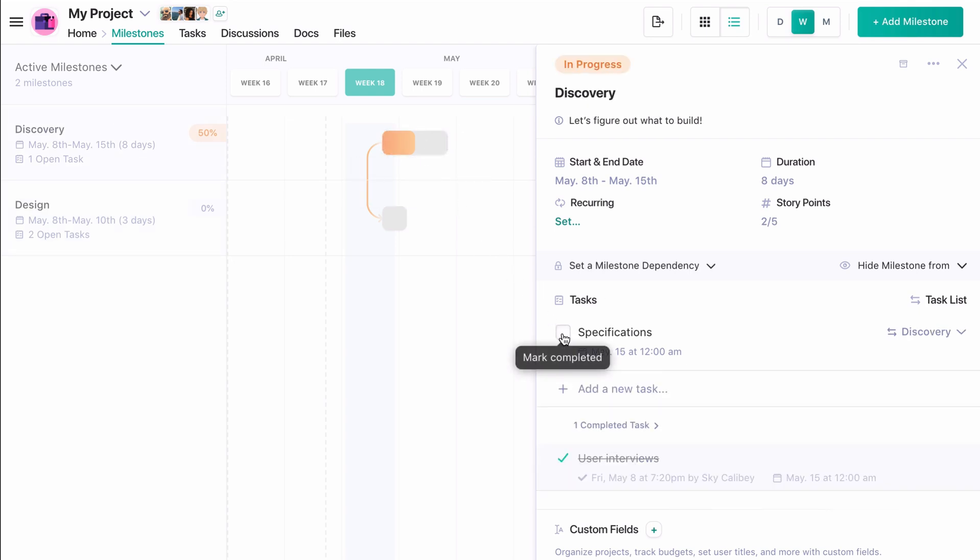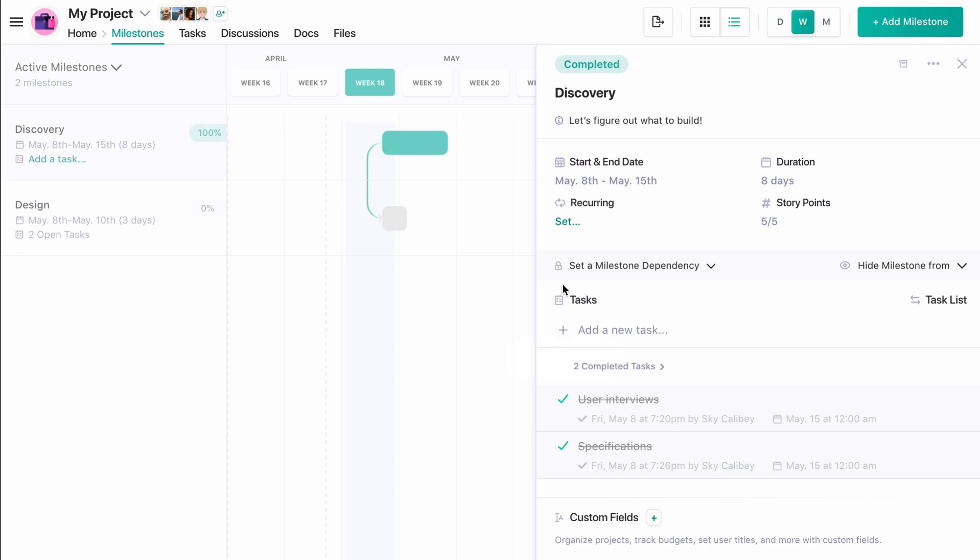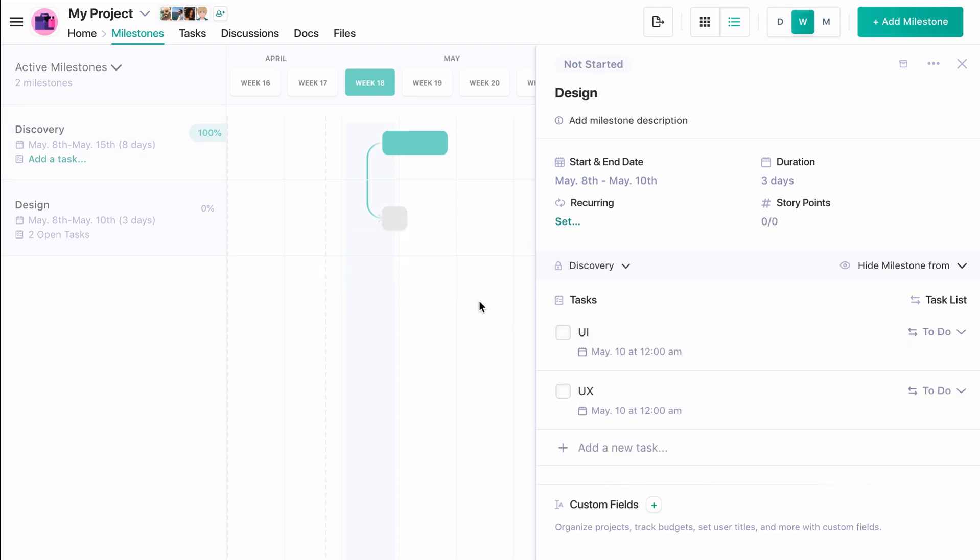Now that our discovery milestone is 100% complete and has earned all five story points, we're free to begin the tasks in the design milestone.